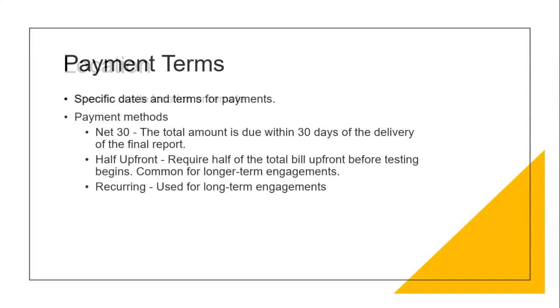Payment terms. You need specific dates and terms for the payments. Normally, net 30. The total amount is due within 30 days of the delivery of the final report. But there are other payment options. You can discuss this with the client up front, and you both can agree on how you will be paid.